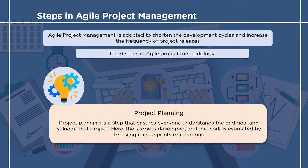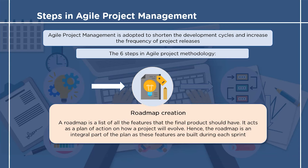Project planning also involves estimating the amount of time needed to complete those sprints. The second step is roadmap creation. A roadmap is a plan of action that shows how a project shall evolve over time. A list of all the features that the final product should have is created, and steps to achieve those features are taken.